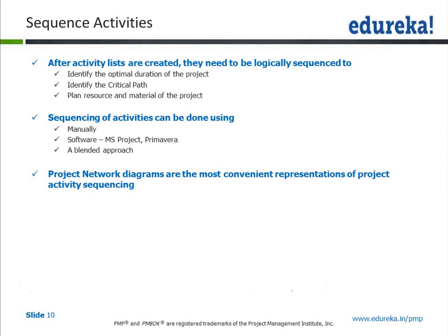It is not possible. So the project manager concentrates more on the activities on the critical path, because any one day of delay in any of the activity of the critical path will change the completion date of the project, end date of the project. But end date has already been communicated to the customer. That's the reason why you will like to maintain that.